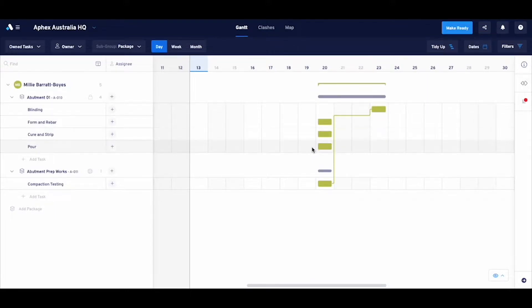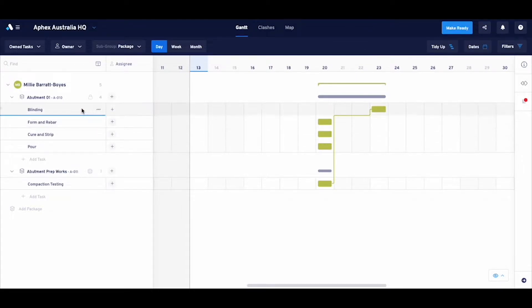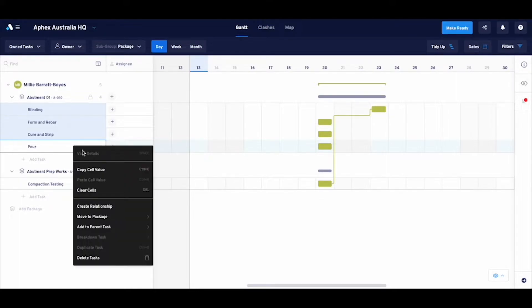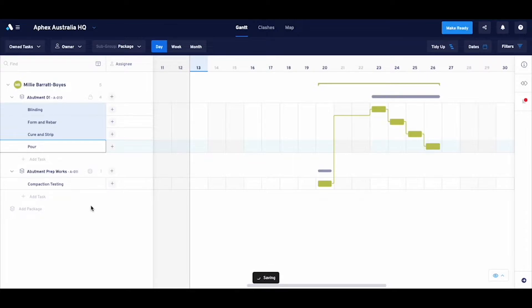I'm pretty happy with the order of the rest of the tasks on the list. So to keep things quick, we'll use another shortcut: selecting the top task, holding shift, selecting the bottom task, then right-clicking and selecting create relationship.